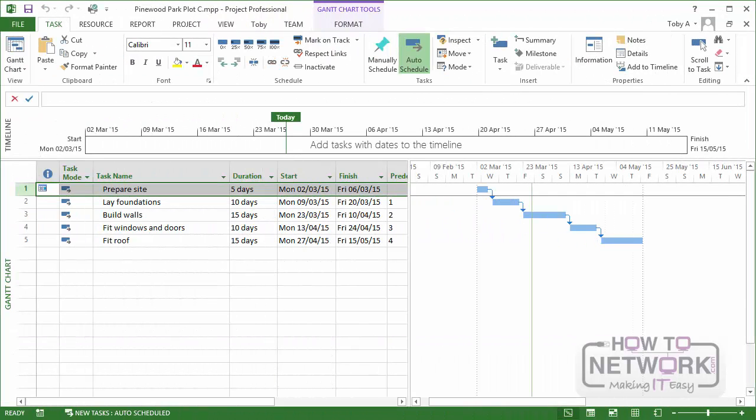Now in this section, I also want to look at deadlines. And on the face of it, having a deadline for a task sounds pretty much like having a constraint on a task. But there are some very important differences. And the first important difference is the deadline, in effect, is informational only. If you set a deadline on a task and say, this must be finished by a certain date. If your schedule says that the task won't be finished by that date. The planning wizard won't say to you, hang on a minute, you've got to fix this because the schedule doesn't work anymore. You will receive visual indicators that the deadline is being missed, but you can go ahead and miss it.